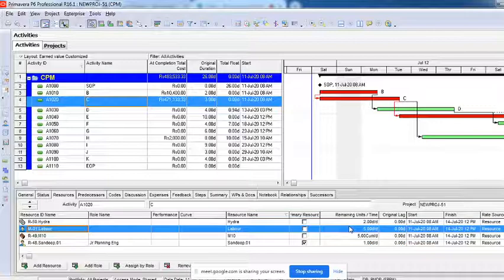Alright, so compare what it will do. It will start allocating the maximum resources that I can give, and that maximum is actually the committed resources. For example, for this particular human resource, there is no committed resource right now, it's only a proposed resource, but I need some commitment, minimum something I want. I should have this much at least, no matter what happens. So that's where this maximum resource availability is what it considers.